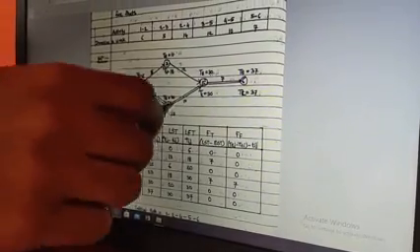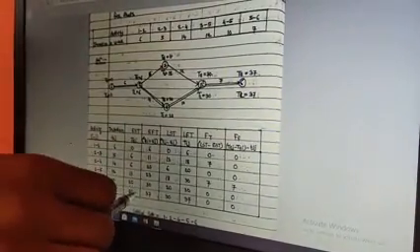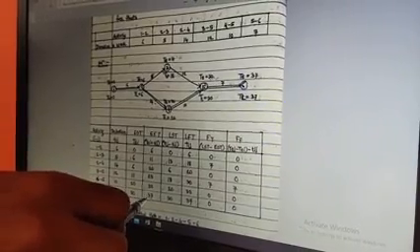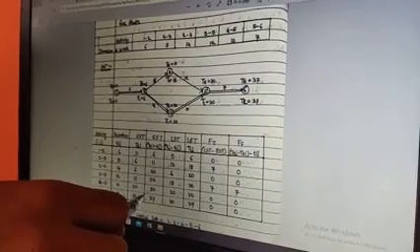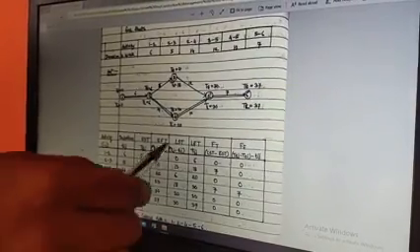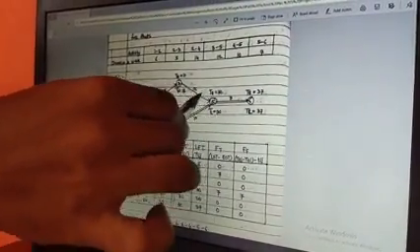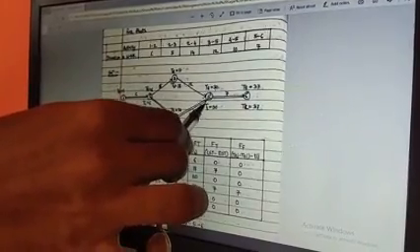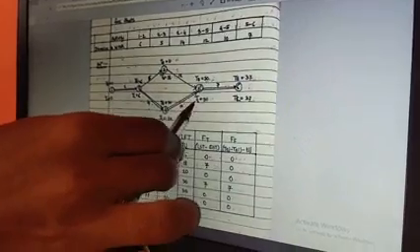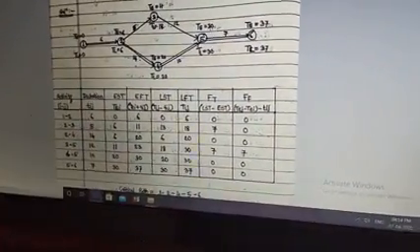So now the last one is 5th to 6. For this activity, the number I have written is 37. Again, how did I get this number? It is very simple. Already up to this activity we have 30 weeks as our duration. So to this, if I add this 7, then at the end the total finish time will be 37 in terms of weeks. So this is all about calculation of EST and EFT.